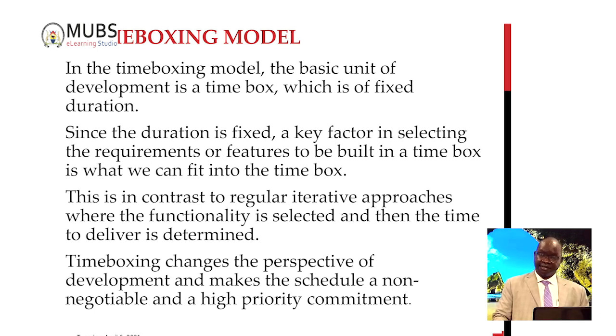If it is hard work, you give it more time. If it is simple work, you give it less time. But that's not the situation for the time boxing model. For the time boxing model, time is the focus. If you set the time box to be 2 hours, then you have to fix an activity that can be completed within that time.